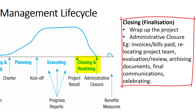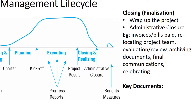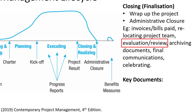Other closing tasks include sending out final communications and having a celebration with the team to thank them for their involvement and effort. A key activity in the closing stage is a project review, where all key stakeholders gather together and evaluate the project. They will ask questions like: Was the project a success? What was learned? What major changes and issues occurred between planning and execution? Was everything done correctly and completely? Were the stakeholders satisfied? How well were scope and other changes managed during the project?